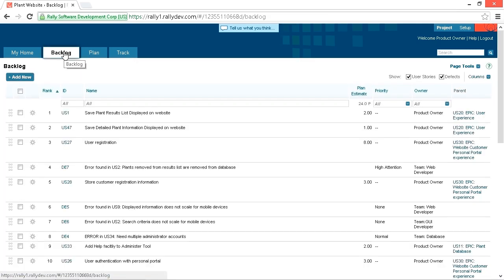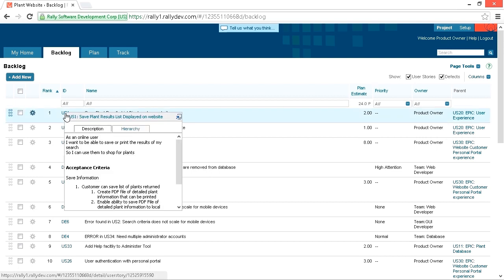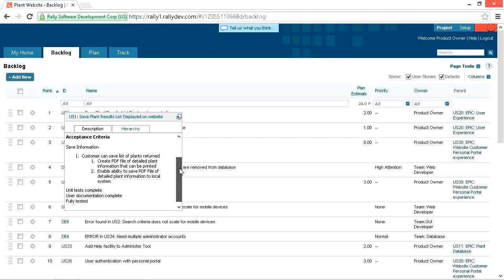Now, as the user story is developed through these negotiations, details are added until the team understands exactly what the story is describing, enough to estimate a level of effort. One of the most important questions the team should ask is, how will I know I've done that? This tells them how to write acceptance criteria to determine when the story is done. Clear acceptance criteria tells the developer how the feature will be tested and gives QA a solid foundation for writing the test plans. If the product owner cannot describe how to know when the feature is complete, more research is needed.